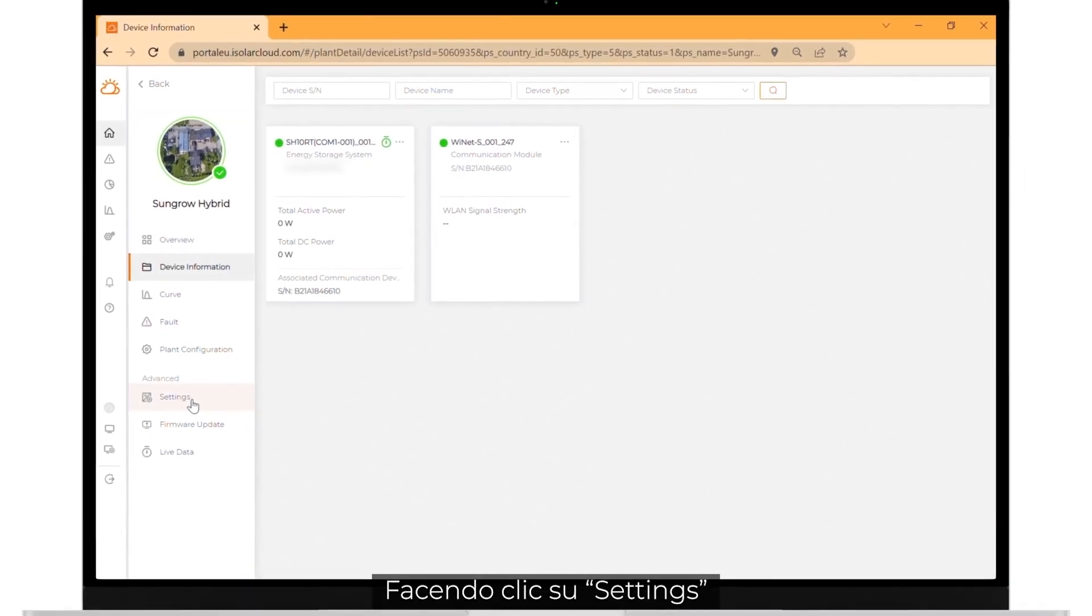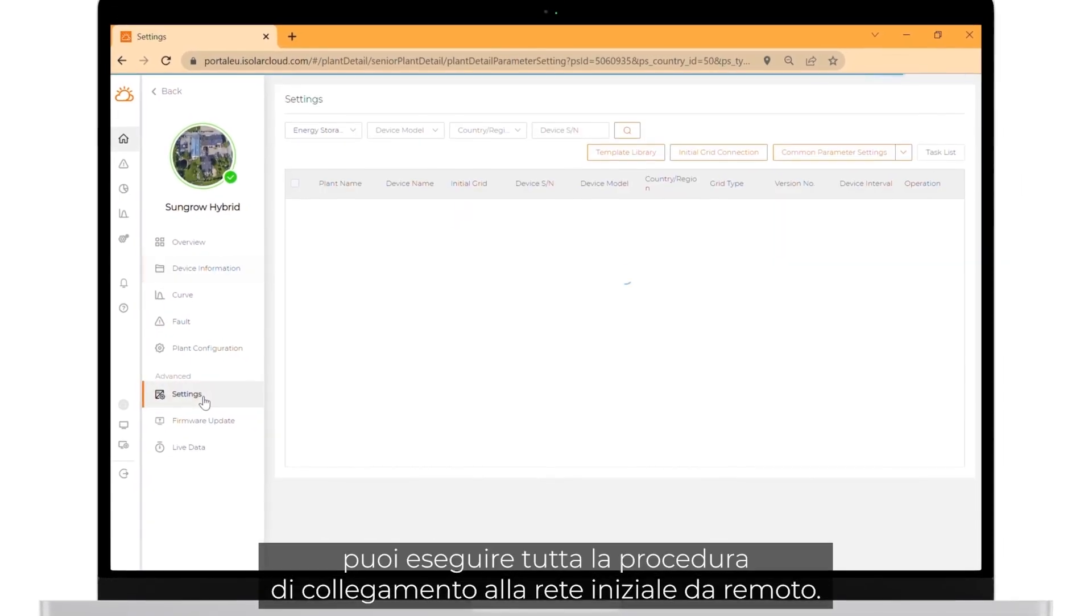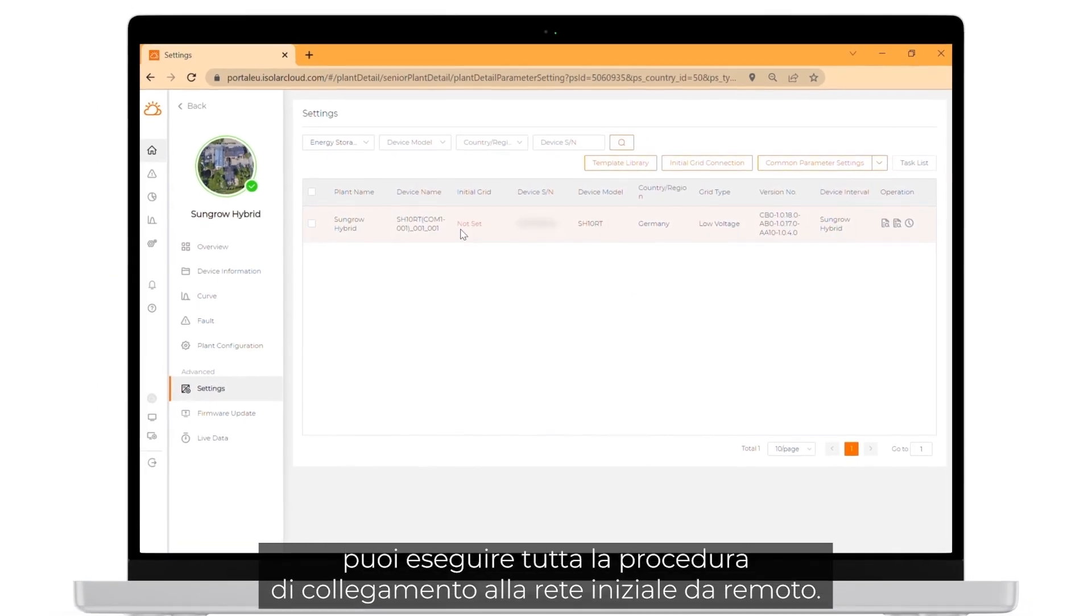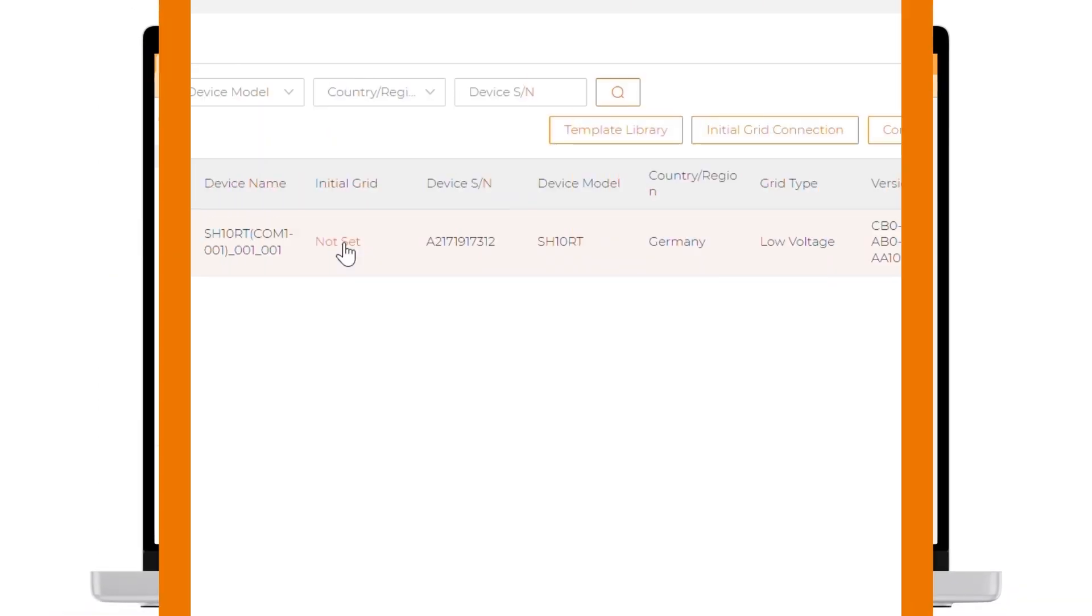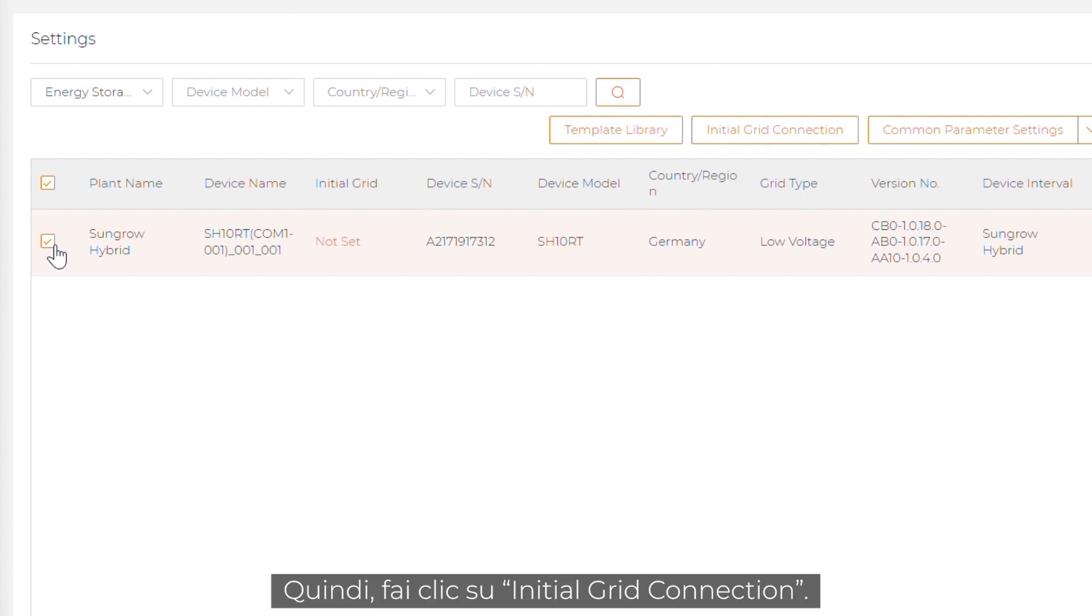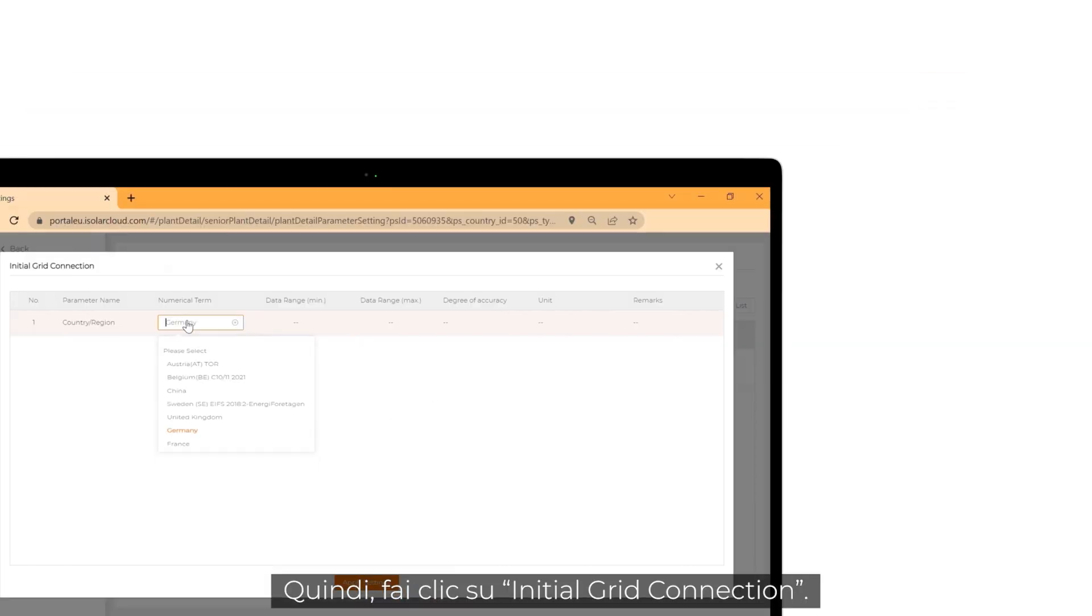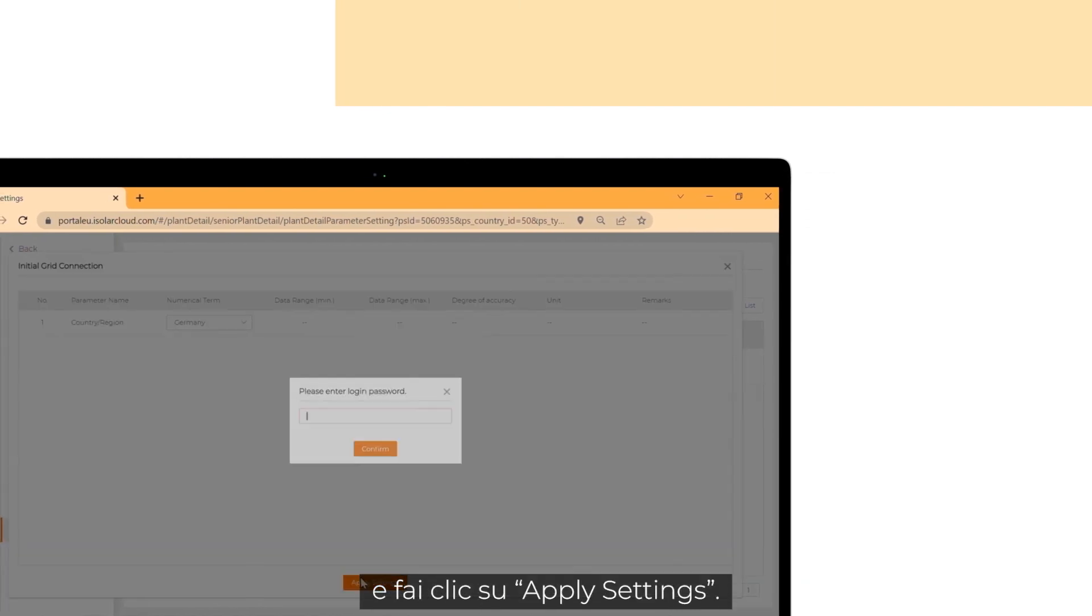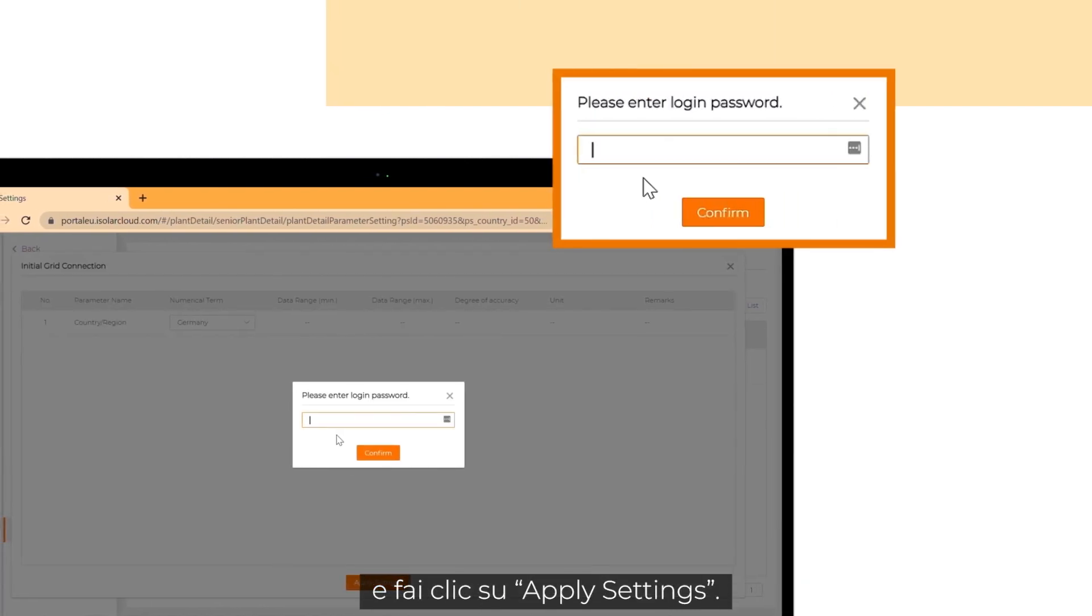If you click on settings, you can do the full initial grid connection remotely. To do so, click on the check box next to the plant name. After that, click on initial grid connection. Choose your country or region and click on apply settings.